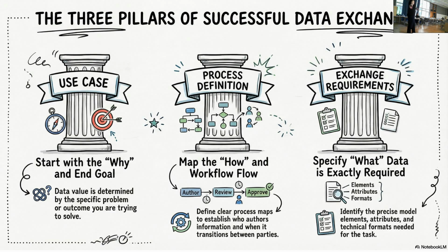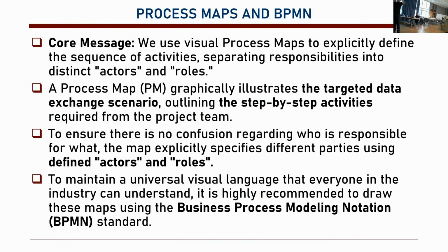bill of quantities. Okay, what is it? Then, how do we do that? Well, you do this, then you calculate them, you then list them, you multiply them, you put them together. And what do you need for that? For that, you need number of walls, number of columns, number of beams, etc. You should be able to list those, okay, and so on. So that's the exchange requirements.